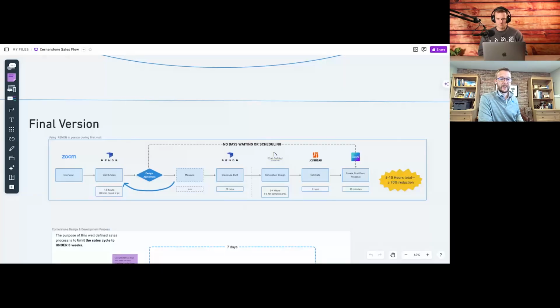If real marble tile is low on their priority list and they have $150,000 to spend on their master bathroom and we're coming in at like 110, guess what we're going to do? We're going to throw that marble tile up there. We're going to say, hey, look, we were able to get some of your could haves, like that marble tile that you said you might like. This proposal includes those things too. So the Moscow report really does come in handy for picking and choosing how we put that proposal together.